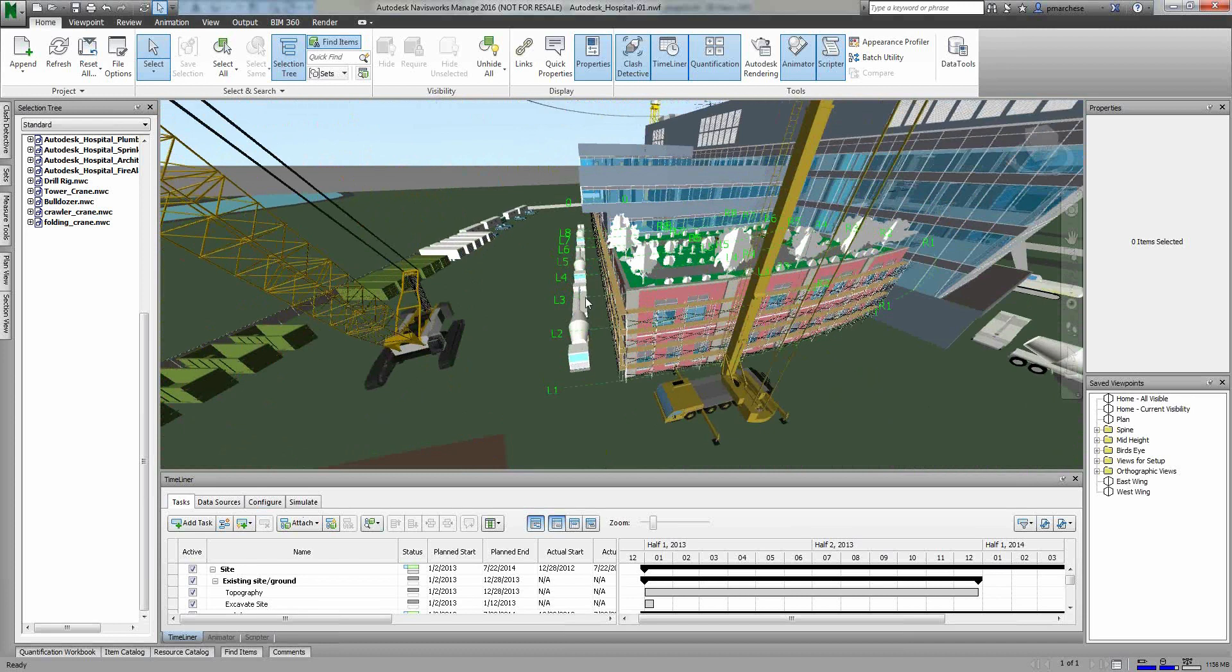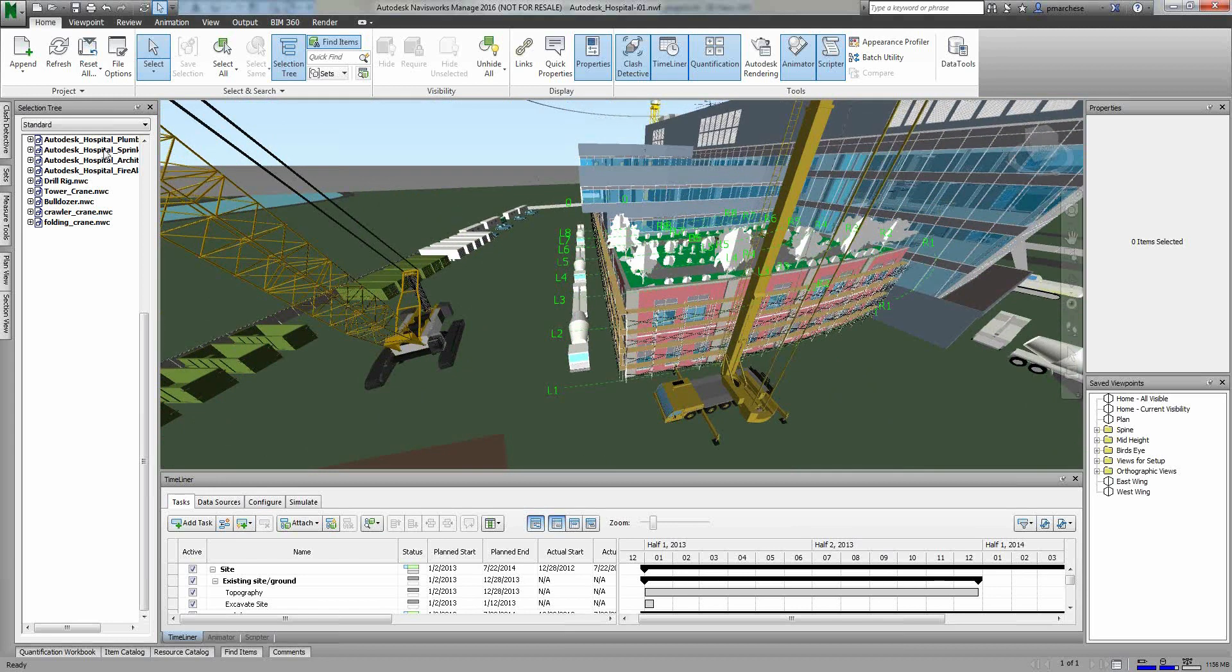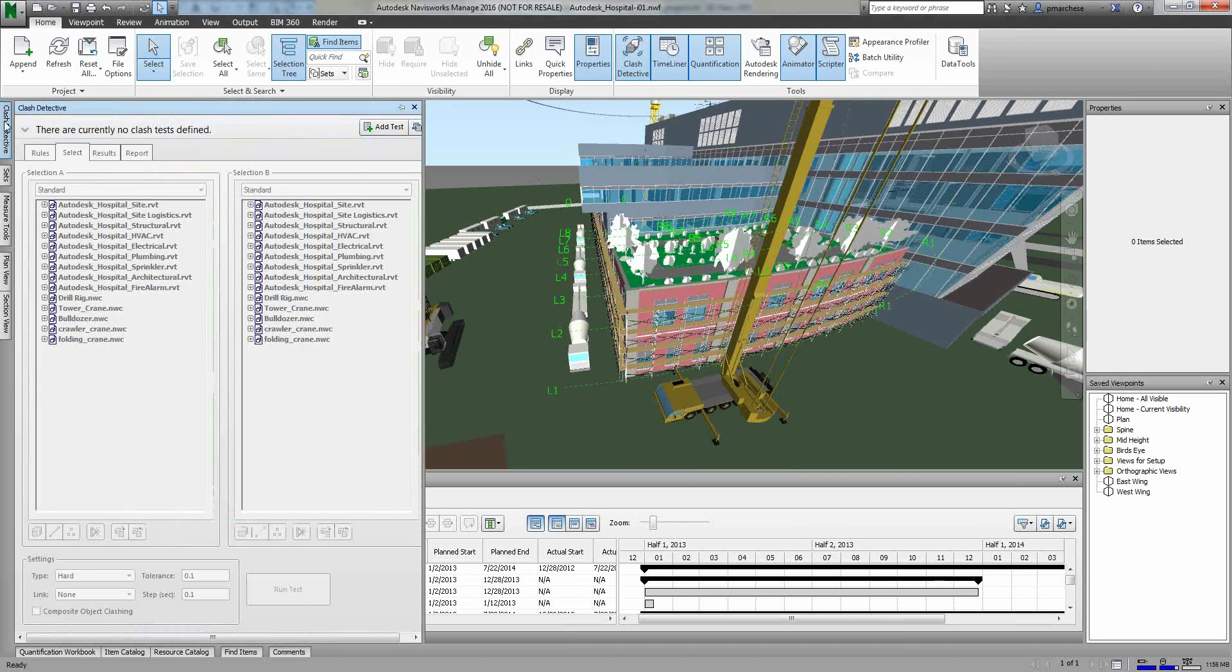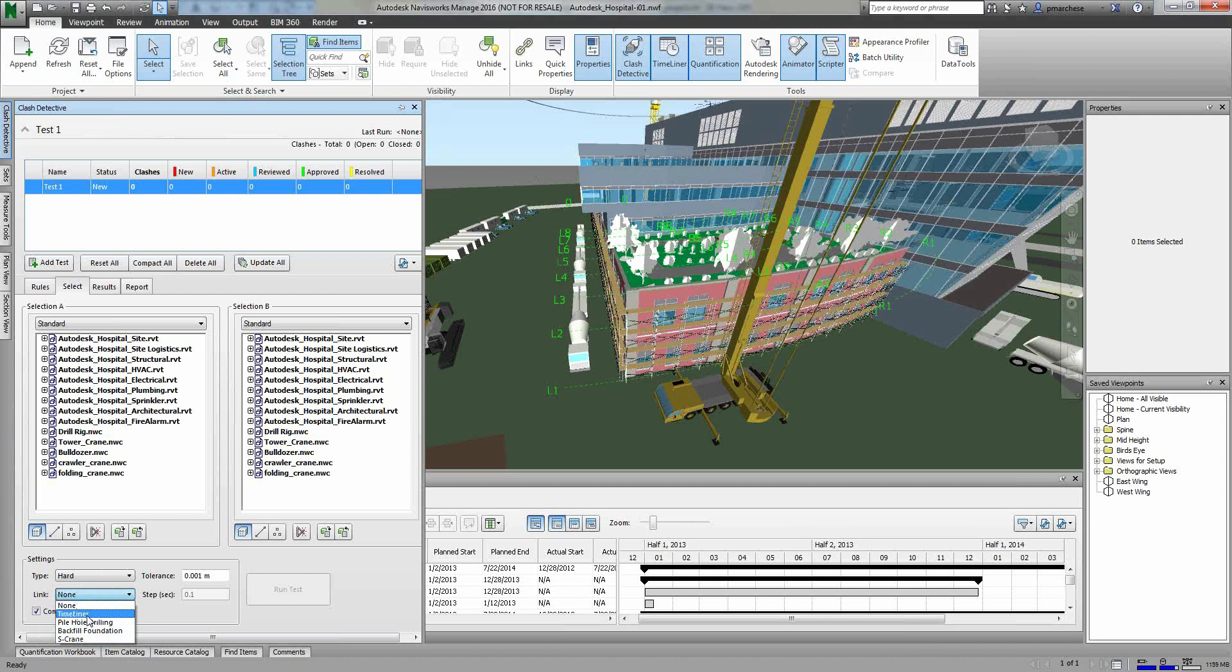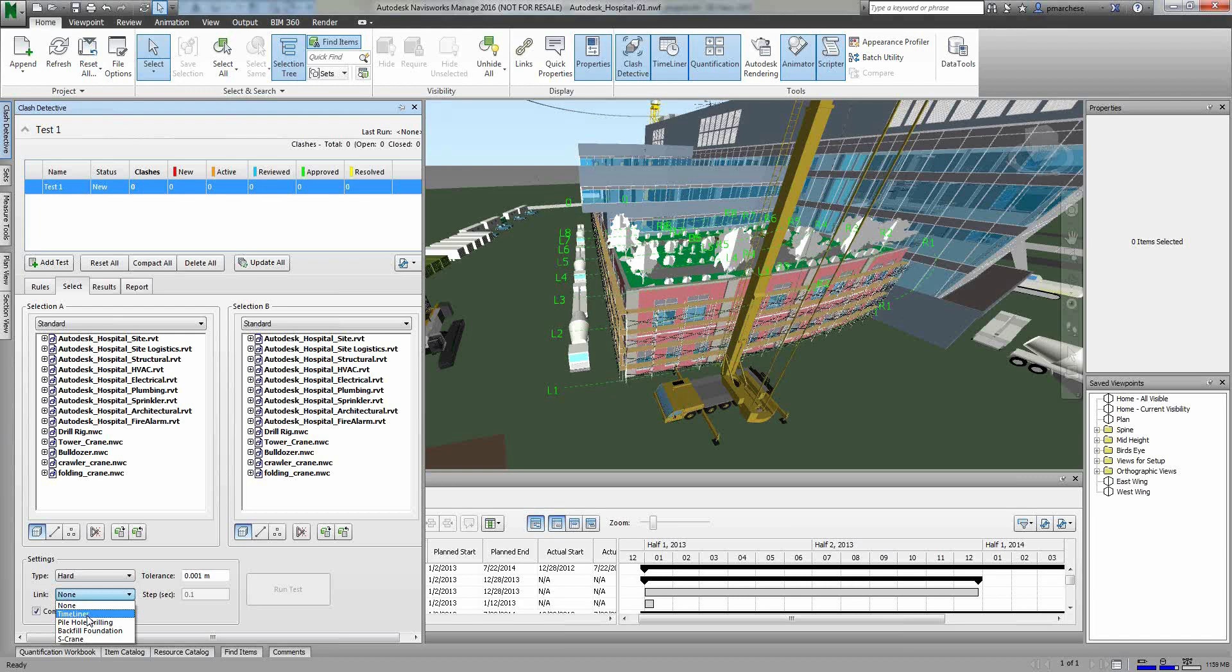Now, the nice thing about this is if you do have Navisworks Manage, because everything I've just done works in Simulate, if you have Manage, one of the cool things I can do is run a clash detection that actually works with that. When I'm actually creating this, I can actually link this to something else, and I can link that to my Timeliner. What that means is let's say I want to run a clash between different objects that I'm working on. An example of this for this kind of situation would be I have cranes, and the crane objects that I'm working with actually have a void built into them that shows me their range. I want to make sure that my two cranes can't actually turn and hit into each other, or they're not going to be overlapping the booms. So I can make sure that as those are spinning, as one moves in, one moves out, they're not actually going to hit each other.